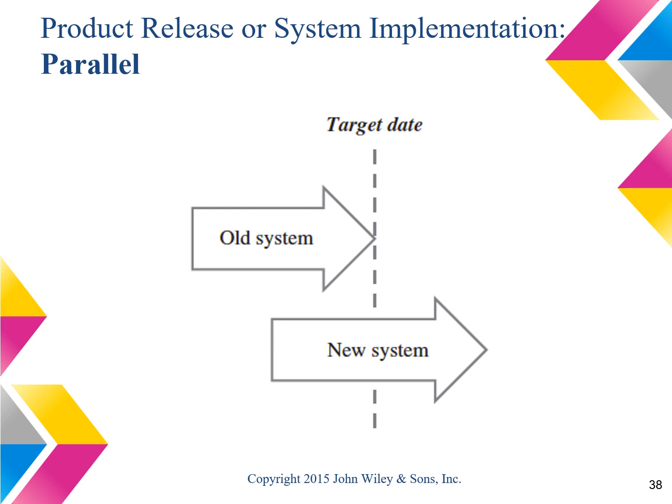We use the same approach for many of our national programs and US courts. By using this implementation approach, courts then chose their transition date based on their preferences and the workload that they were dealing with in their local courts.